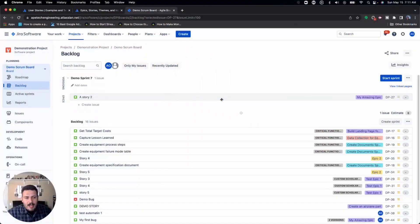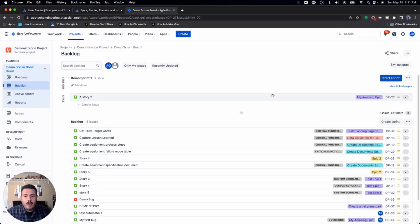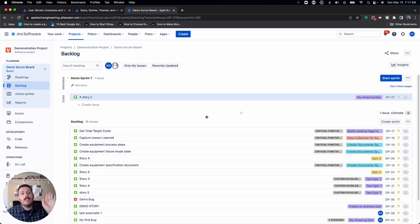You don't want to give a pre-established story to the developer because you want to remember that the story points is the developers estimate of the complexity of the task from their perspective, not from somebody else's perspective. So in order to minimize that, I recommend that you hold on putting points until you bring the issue into the sprint.